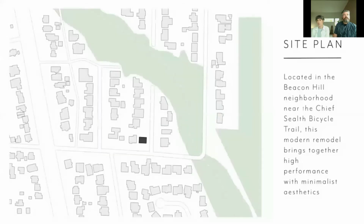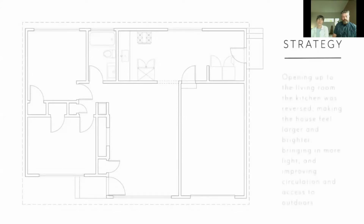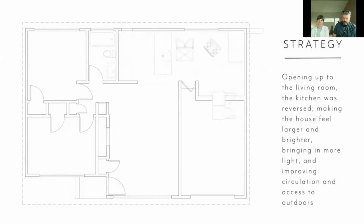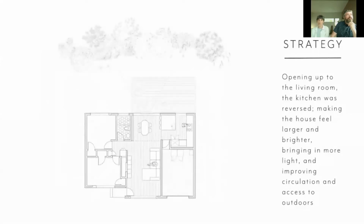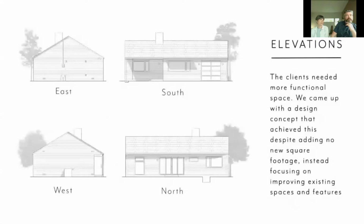And then cost per square foot for that was about $485. There was a lot of troubleshooting involved with that project, and changes along the way. With rehab, we could call this a remodel, but it was really a rehab. It was very outdated, with deferred maintenance. It was really in rough shape at the beginning, and we brought it up to feeling like a brand new home. So I think cost per square foot reflects that. Also some of the higher end choices on the envelope and, well, I think the finishes. Yeah, also a little bit.